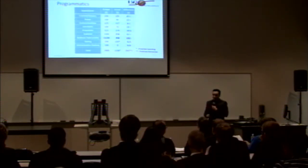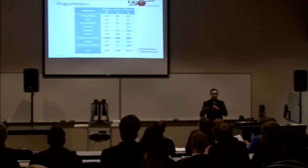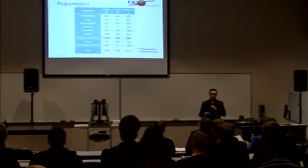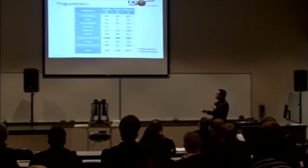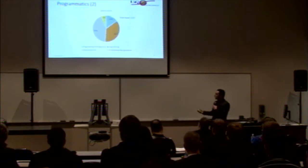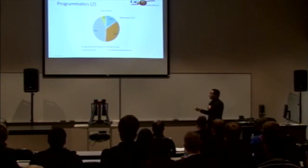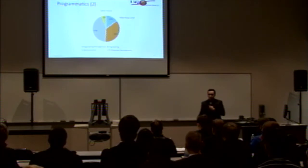Administrative reserve is basically an emergency fund that we can allocate to a subsystem in order to complete the subsystem, purchasing parts and other components. And so our total, as discussed earlier, is $1,400. Here's the summary for the actual, and we come up with a remainder margin of $292. Moving on to our labor hours, we have the highest of administration, which is basically the deliverables that we have to do for the coursework,